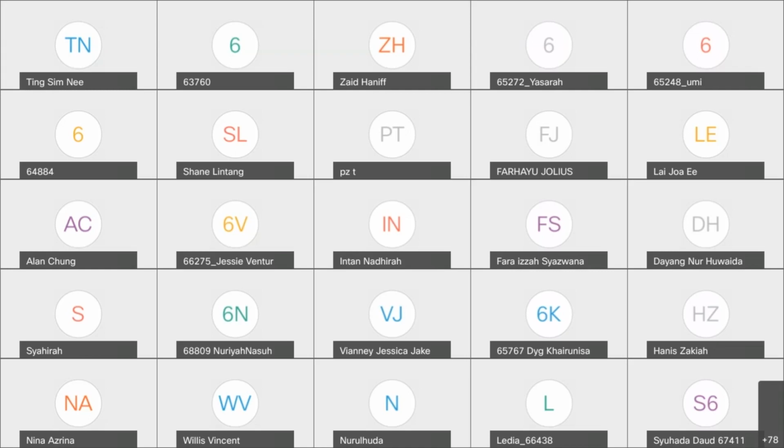If there are no more questions, I will answer Alan's question on the utilization of site. Yes, site utilization will be part of your IDP plan. Where you put your material, your site office, where you are doing construction, where you put your machineries, where the ins and outs are, all of that is part and parcel of your IDP later on. You will project that in your IDP one already.